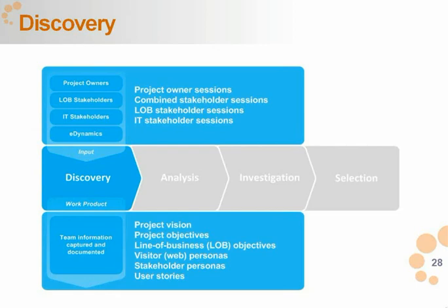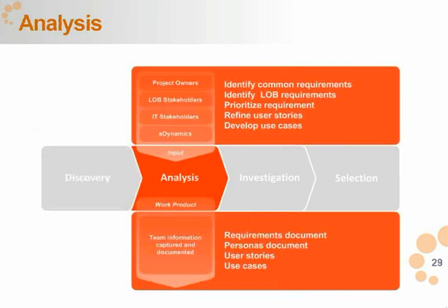In the analysis phase, we take a lot of what we've now put together in the discovery phase, and we start looking at what we've collected, common requirements, see if we've got duplicates. We have some internal negotiation with stakeholders on the meaning of some of these requirements. We begin to prioritize things and refine the stories and use cases that we've developed. And finally, we're able to develop the requirements document, the persona document.